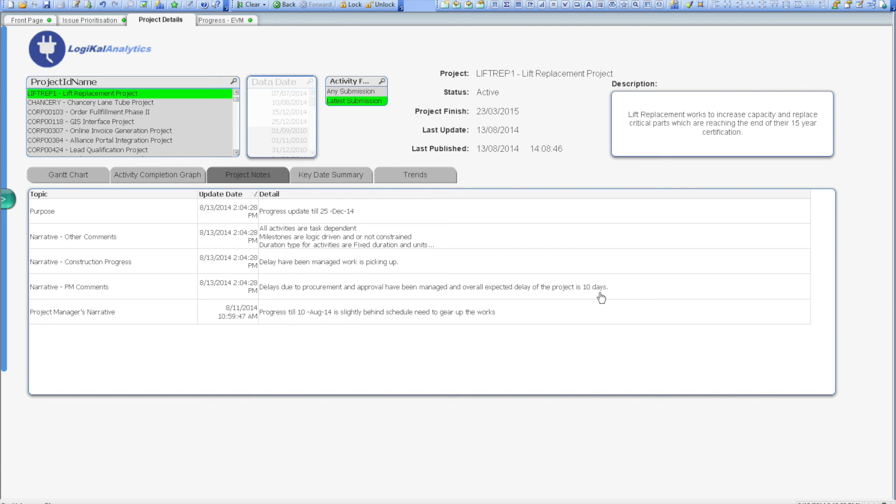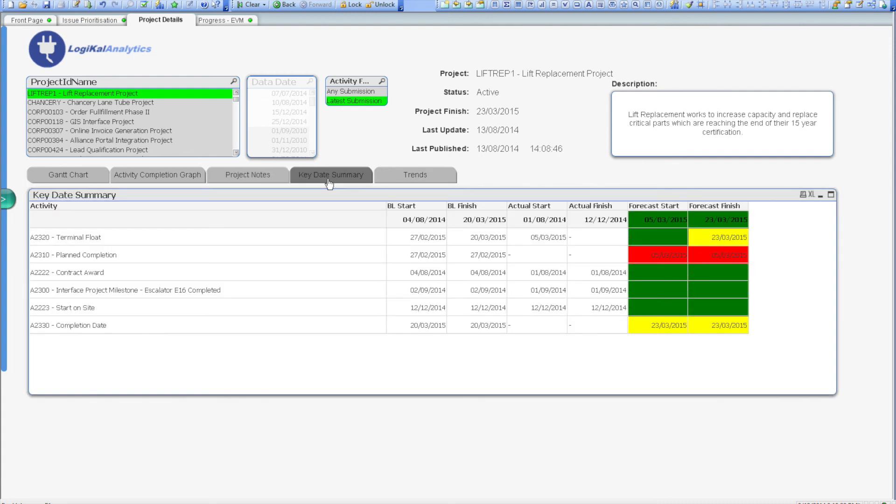So, how can I tell if my key delivery dates and interface milestones are still on track? The key date summary screen is where you can view this information. The screen simply shows a basic traffic light report flagging whether finished dates for the key deliverables are on track compared to the baseline.